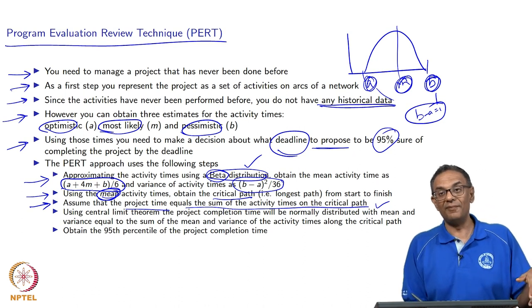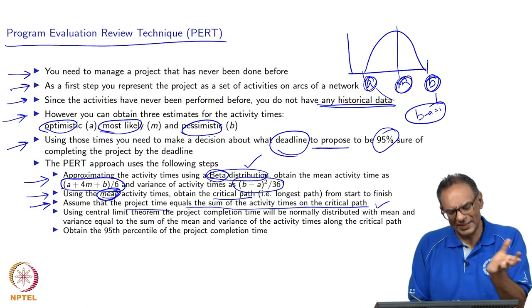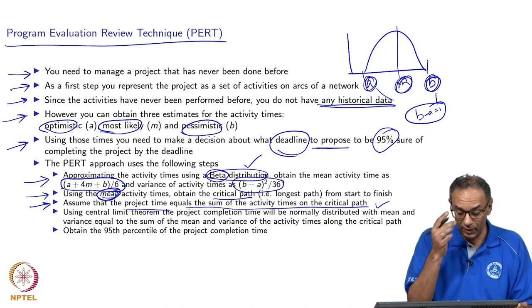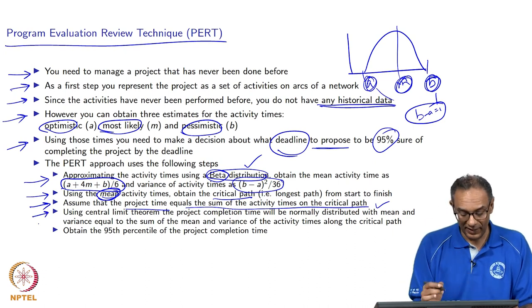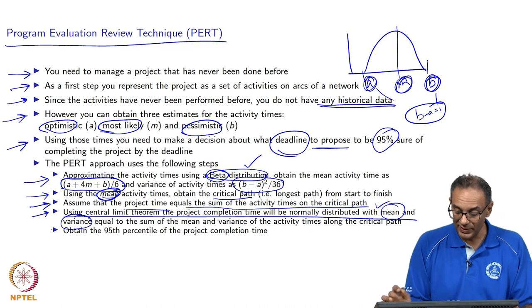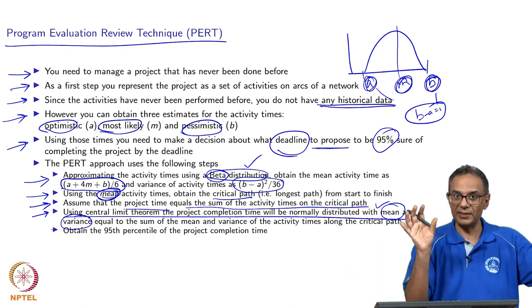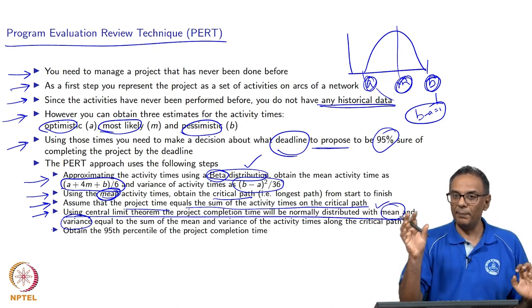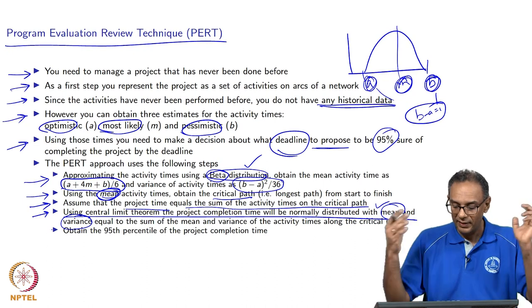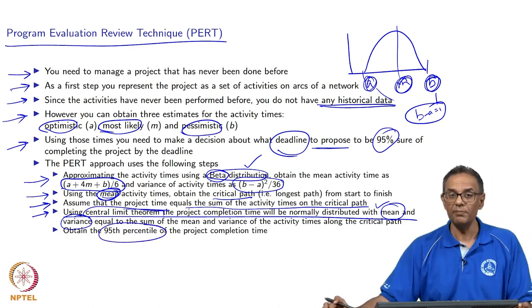The critical path is computed using the average values. As a decent approximation, among the average times we take the longest. Then we apply the Central Limit Theorem: the project completion time is normally distributed, with mean equal to the sum of the means along the critical path and variance equal to the sum of the variances along the critical path. Adding independent random variables yields a normally distributed result, and then we find the 95th percentile of the project completion time.